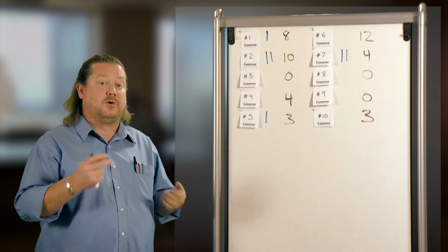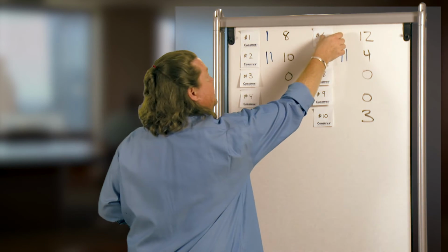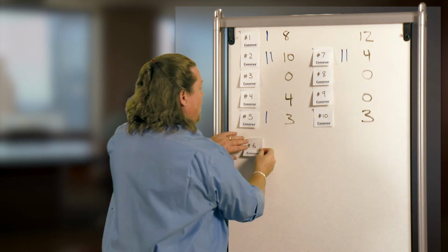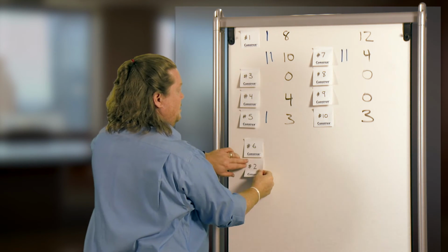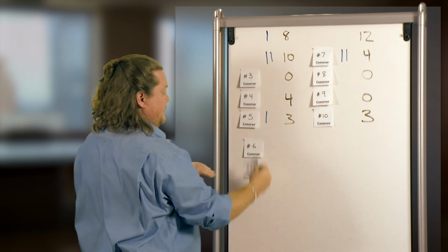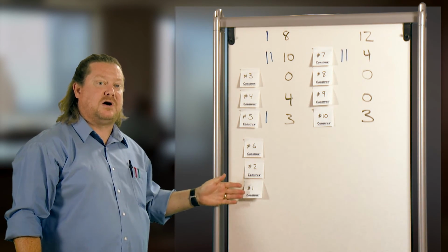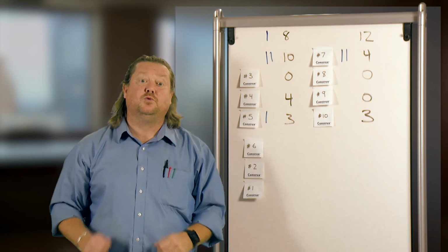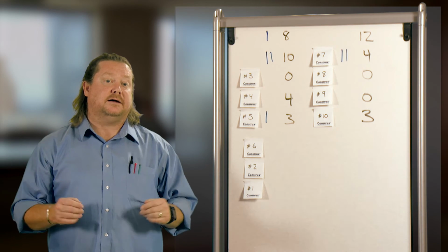And you just reorder the items. In this case, the most voted for item was number 6. It is now your new number 1. The next item is number 2. The next item is number 1, etc. And you just go down the list and reprioritize based on the votes. It's a really great method of figuring out priorities on the fly.